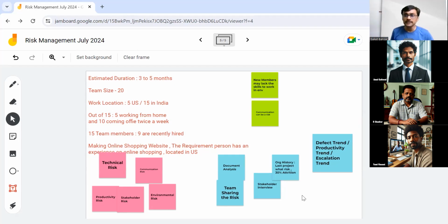So say you are getting defects from the customers every week, 2, 3, 2, 3. Though the customer is not escalating about it, you see that if the defects keep coming like this, we may reach a level where we have customer escalations. So you can say that if the trend of defects increases beyond 2 defects, which is where it is right now, we may have a situation of customer escalation, which will create a problem for our future brand.